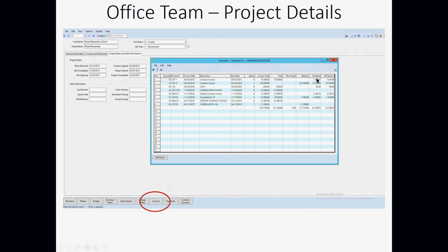And so from an invoicing view, we've got all of the invoices that have been viewed or generated, what they've been, whether they've been paid or not paid, right? What's the holdbacks? So if you've said on this particular customer or on this particular job that there's a 10 or 15% holdback, every time that you invoice, the system will automatically do that for you. And then when you get the engineer's release, and you can build that into the project as well, then you can bill out for this other $7,500. Okay? So all of it's being maintained inside the system, and it can certainly give you some control and flexibility over what's going on a daily basis.